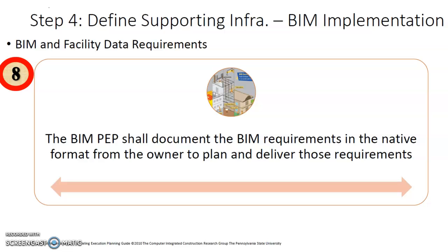For example, you need to put in information that is relevant. Say you have a door and the door is fire rated. You need to then put down what is the fire rating of the door. As much as possible, you may also want to put in information in relation to the door components, who is the manufacturer of the different door components, so that when the time comes for the facility team to replace the door or the components, they already have access to the information in the model itself. So that is very important to the O&M or the FM people.